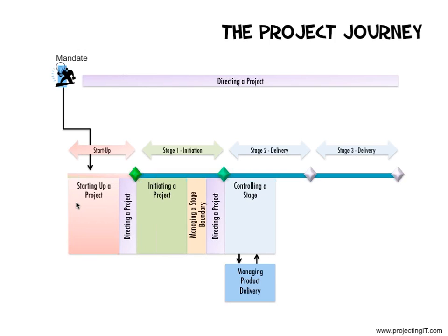If tolerances are forecast to be exceeded, the team manager notifies the project manager by raising an issue. The team manager does not create an exception report, however, raises the exception by notifying the project manager. The project manager will check if the team's problem is within stage 2 tolerance. If the project manager can advise, the project manager tells the team what action to take next. If the work package tolerance also threatens the stage 2 delivery, then the project manager notifies the board by raising an exception report.